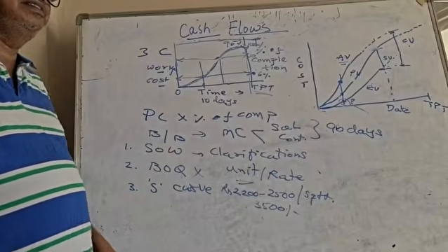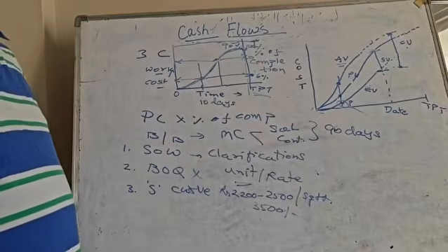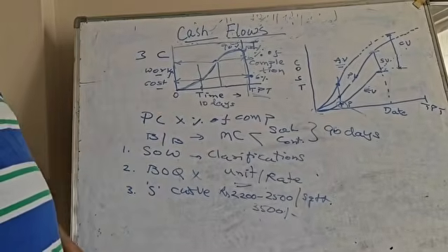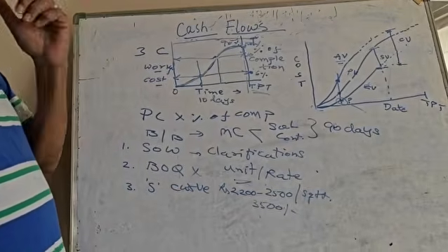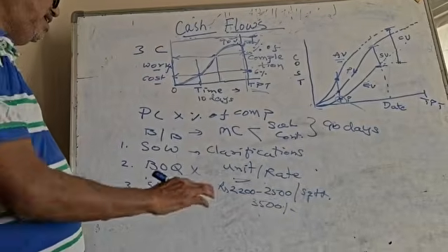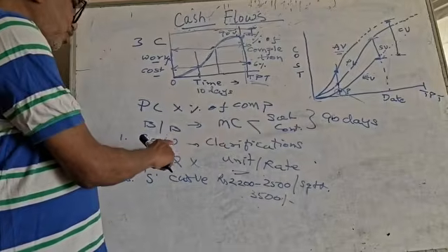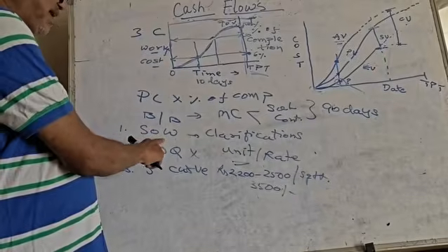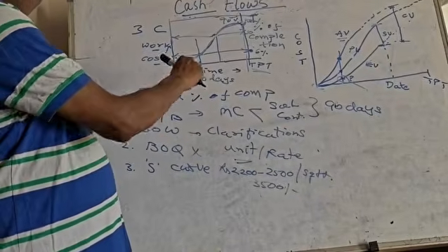So when brand name is not given, they write the specification in such a way that that brand only will be suitable for using in BOQ. So that is how they compel the main contractor to go for that particular brand only without naming the brand in SOW. So that is how it works.